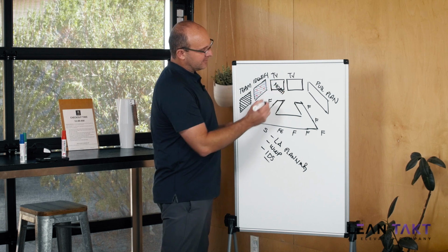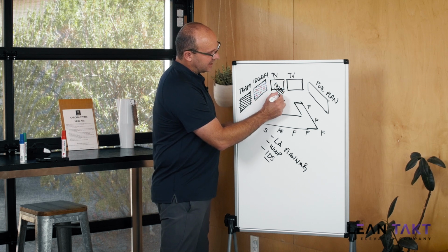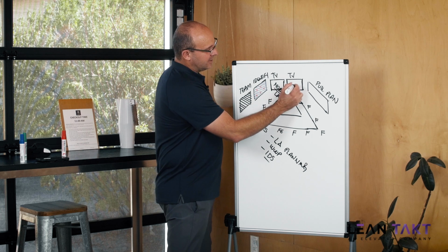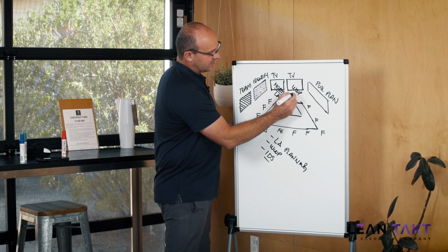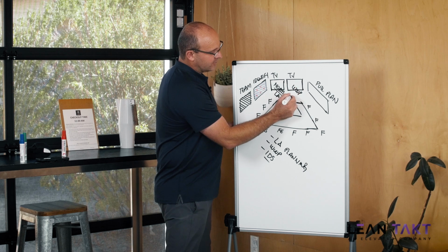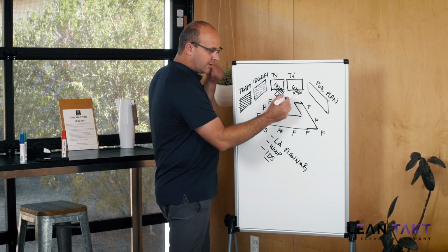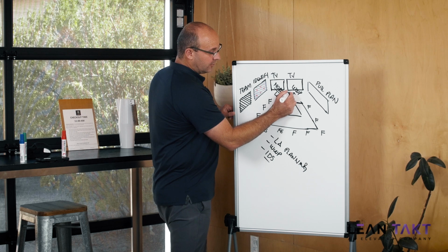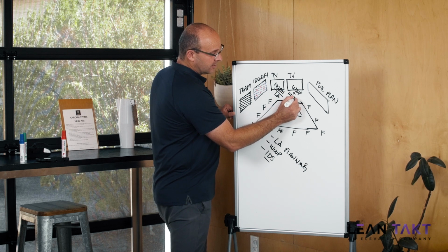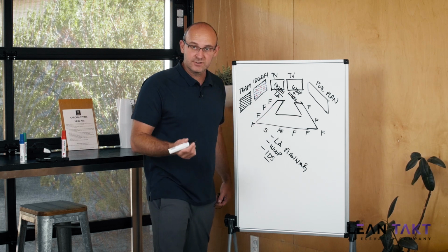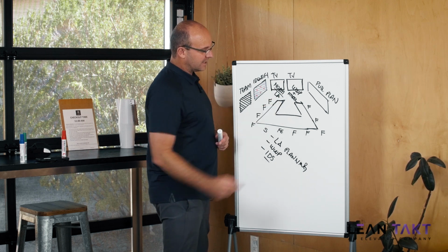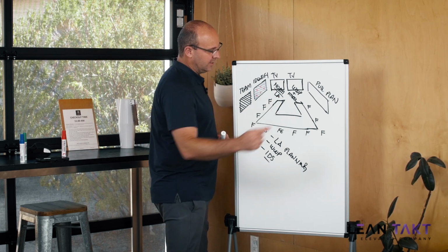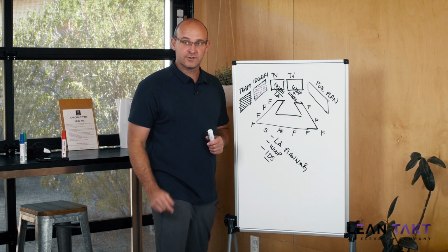In your norm level takt plan, you will automatically have your look ahead, and then you can pull up your weekly work plan either on the left screen or on the right. I would also say that you can pull up other visuals like your model, pictures, anything else that you might want to see. But the bottom line is you must have the norm level takt plan, the look ahead filter and the weekly work plan filter in order to do this meeting.